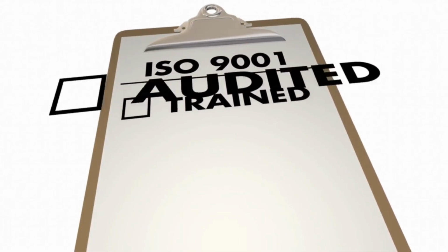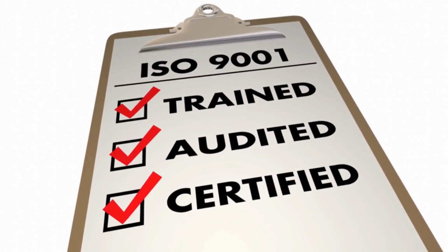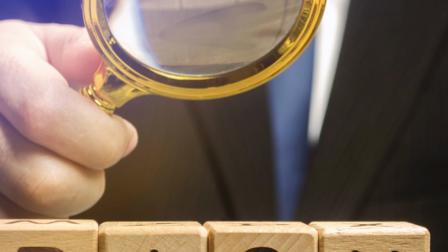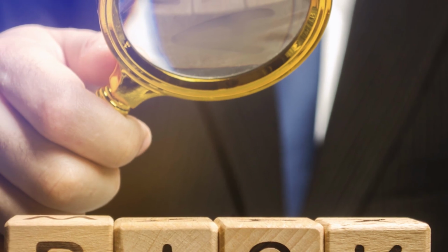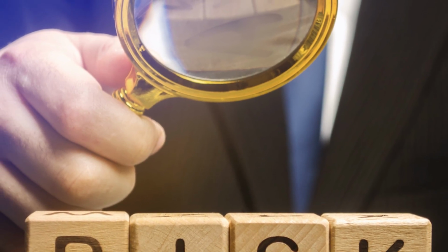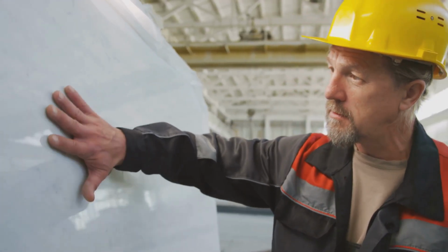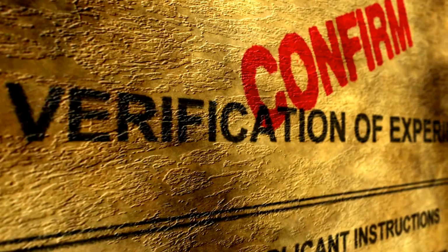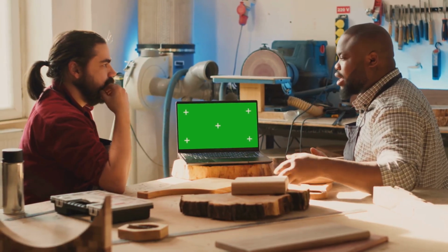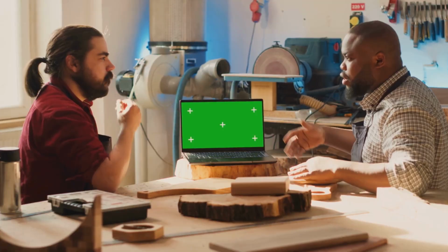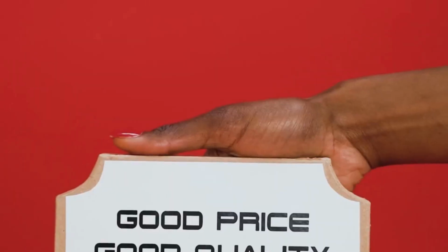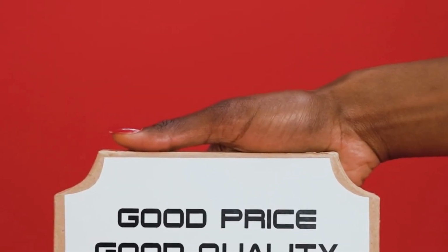Verify legitimacy and competence. Past similar projects, photos, videos of CNC, EDM and quality lab, or a third-party inspection. Contact references and ask about communication, quality, and adherence to deadlines. If high value, escalate. Visit the factory or hire a local inspector. Verify ISO 9001 and business license to avoid middlemen. Narrow to 3 to 5 qualified candidates. Do not choose based only on a low price. Price is irrelevant without proof of capability and reliability.